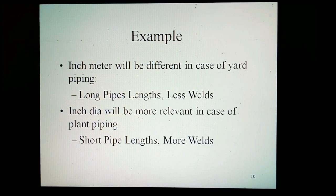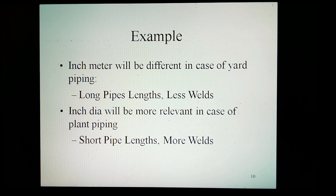The inch-meter will be more relevant in the case of yard piping — long pipe lengths, fewer welds. The inch-diameter will be more relevant in the case of plant piping — short pipe lengths, more welds.